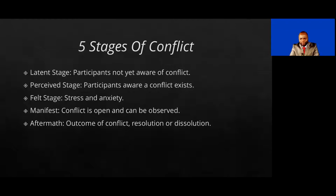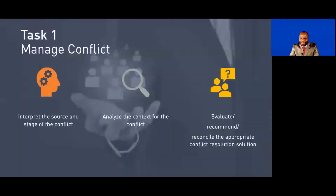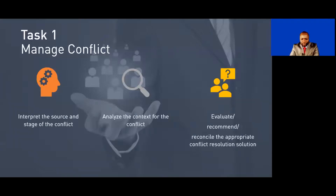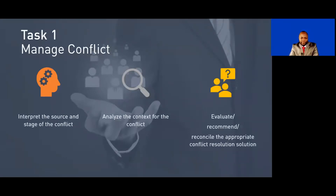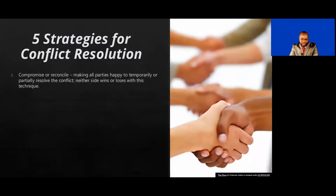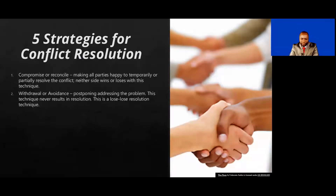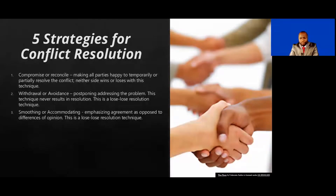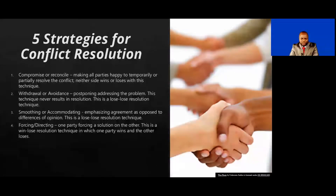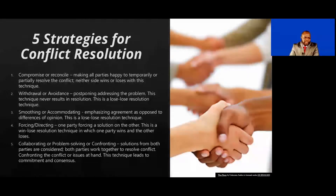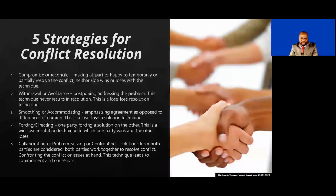The last of the three overarching things is to evaluate, recommend, or reconcile the appropriate conflict resolution solution. For your exam, you can expect questions that test how you are going to address the conflict. The PMBOK Guide has five strategies for conflict resolution: compromise or reconcile — making all parties happy, temporarily resolving the conflict; withdraw or avoid — don't address the conflict immediately; smooth or accommodate — emphasize agreement as opposed to different opinions; force or direct — one party forcing a solution on the other; and collaborate or problem solve, which we also call confront — solutions from both parties are considered, and it typically results in a win-win when done correctly.